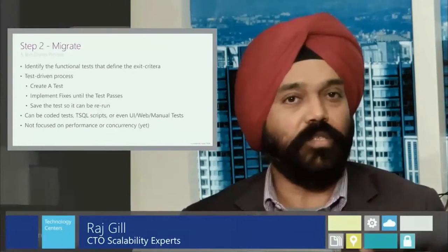So it really depends on the level of complexity you want to build into the migration validation, but this is a step where you have to really make sure that you are coming up with the proper tests to validate that migration. Now remember, what we are not worried about here is the actual load testing of the application. That we'll deal with later on. But what we want to do is all the functional testing and all of the testing that basically tells the business owner that yes, this application works just like it works in Oracle. Right. That is what we want to accomplish. Some of your traditional UAT, user acceptance testing. Yeah, absolutely.